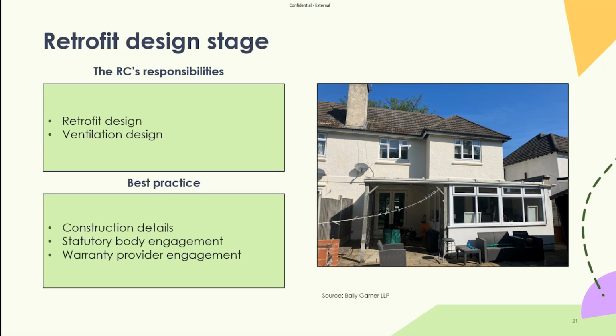So again, we hand over to the retrofit designer at this stage. One thing I always do is just make sure that they do actually have the right qualifications. There are quite strict requirements in terms of those qualifications that they need to hold. Another really useful document when you're reviewing designs is the Measure Interaction Matrix, which is D1 of the PAS standard. And that lists out all measures on the X and Y axis of this table, and then defines what design documentation needs to be produced.